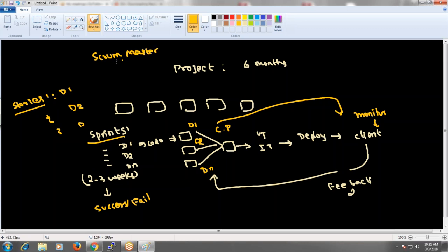This master will define the tasks and the sprint duration: two weeks of sprint duration, total 10 sprints for this project, each sprint is two weeks. And these are all the stories for that particular developer. Then based upon that, each and every developer needs to play their part. They need to get their hands dirty in that particular sprint, and each one needs to be an individual player. Since this process is continuous, we need to do some automation. So this is the agile.